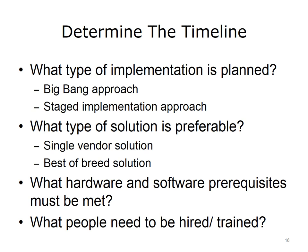The type of EHR chosen may significantly affect the timeline for the implementation process. The timeline will also depend on whether hardware and software prerequisites have been met; for example, the organization must ensure it has sufficient workstations that meet requirements to operate the EHR. The timeline will ultimately depend on the availability of key personnel. The organization should assess whether it needs to hire and train personnel before the implementation and factor these activities into the timeline. Determining the appropriate timeline can be a complex but critical process for a successful EHR implementation.